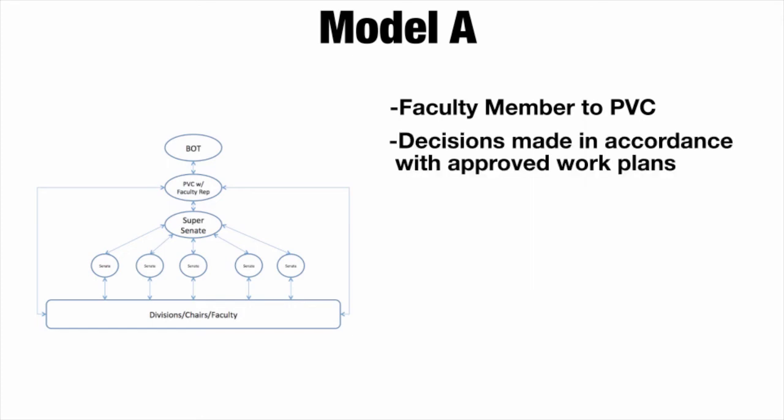Decisions are made in accordance with approved work plans. Each plan will be initiated with a work proposal to be approved by PPC. The work proposal will indicate the goals, outcomes desired, stakeholders, team or committee members to work on the project or decision, the decision-making process itself, who decides how a decision will be finalized, the communication plan, and a timeline.